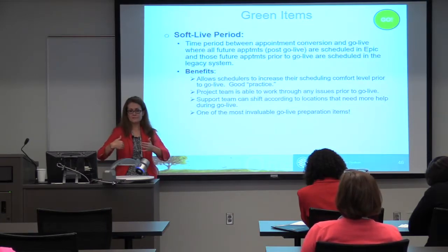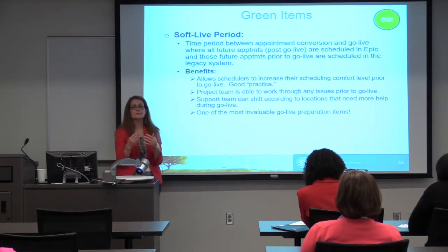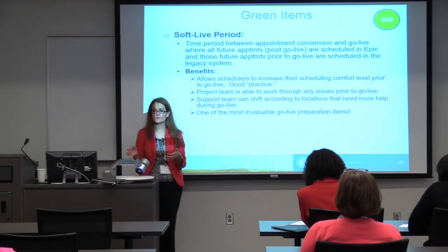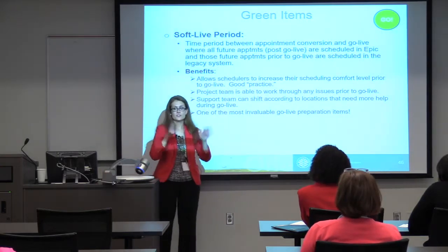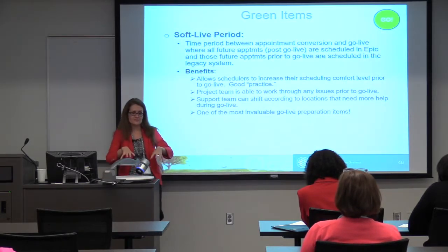If you go to the doctor's office and you have an appointment for 11:15, that scheduler is going to schedule you in Epic. But if you come in and want an appointment for 10:29, they're going to schedule you in GECB. So during the soft live period, they're in two systems.